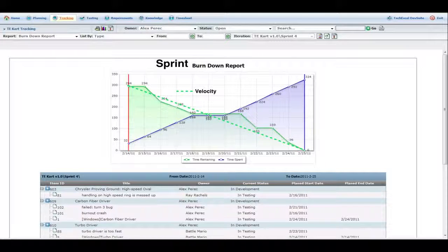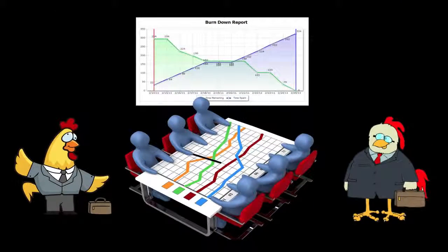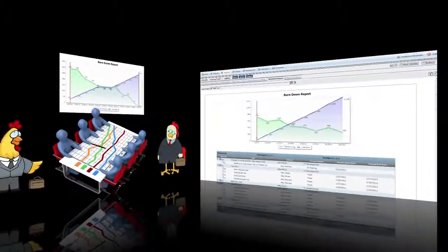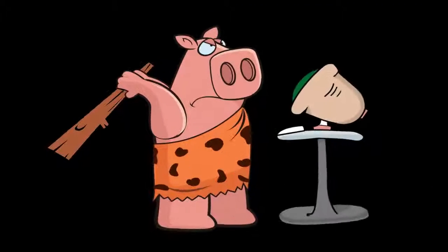The sprint burndown is generally used internally throughout the sprint and should be displayed somewhere prominent that all team members and stakeholders can see. A release burndown differs mainly in scope. Since with many products it will take multiple iterations to complete a release, a release burndown tracks overall velocity as progress is made towards a release. With the release burndown, we track story estimates and are more concerned with the average velocity over multiple sprints as opposed to the velocity of individual sprints.